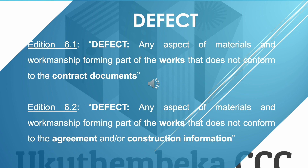Edition 6.1 defines a defect as 'any aspect of material and workmanship forming part of the works that does not conform to the contract documents.' Edition 6.2 reads: 'any aspect of materials and workmanship forming part of the works that does not conform to the agreement and/or other construction information.' The word 'agreement' has been added in 6.2 because the contract documents definition was deleted, and it automatically includes drawings and price documents through the use of 'agreement.'